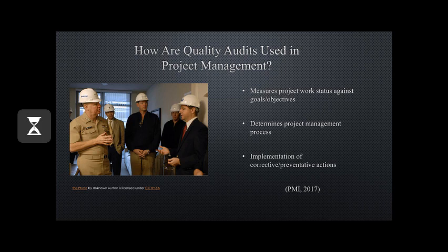Say, for example, that an audit was conducted on your project. You think that you are on track with scope, budget, and timing. An external auditor comes in and states that after a huge milestone halfway through the project, you will be short on material and human resources. This will give you enough time to address the issue that will be coming down the pipeline and would greatly